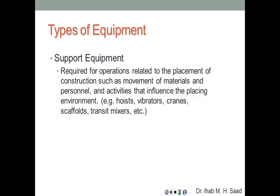The second type is support equipment — still needed for the project, yet it does not produce end units counted as bid items. It's required for operations related to placement of construction, such as movement of materials and personnel. These include hoists, cranes, vibrators, scaffolds, and transit mixers. Scaffolds, for example, are needed for labor to place concrete or masonry, but you cannot have a standalone pay item called 'scaffolds' in the bid — its cost is embedded in the units it supports.